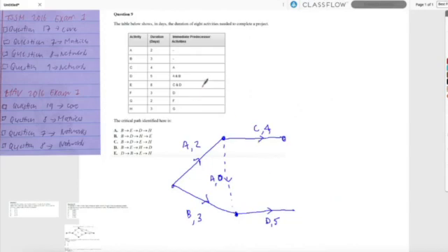E has C and D as predecessors. So look, I'm getting another dummy here. I'm going to put E off the back of C, and it goes for 8. But D also is an immediate predecessor, so I've got another dummy. There's probably another way to do this. F, straight off D. Yeah, I can do that. And it goes for 3. G, straight off F. H, straight off G.